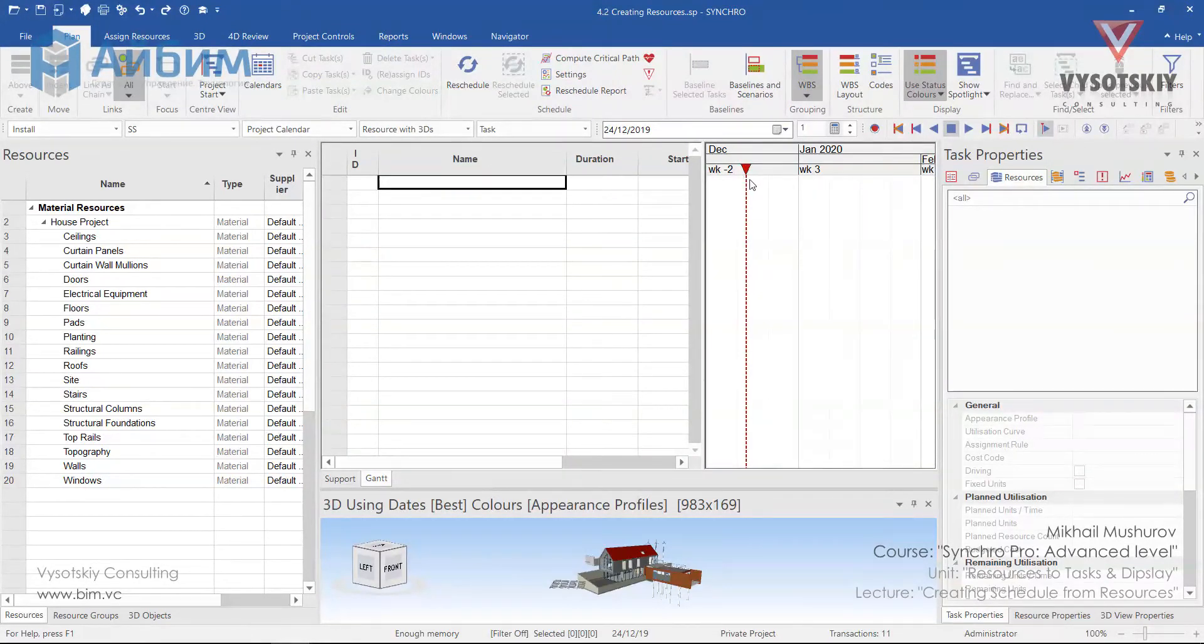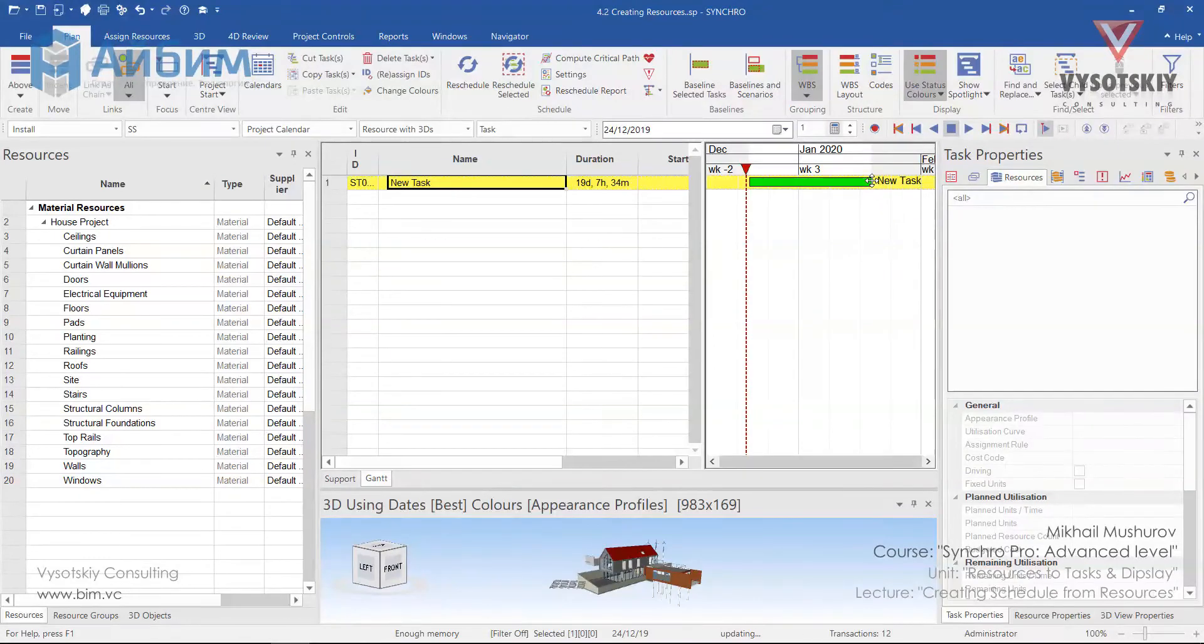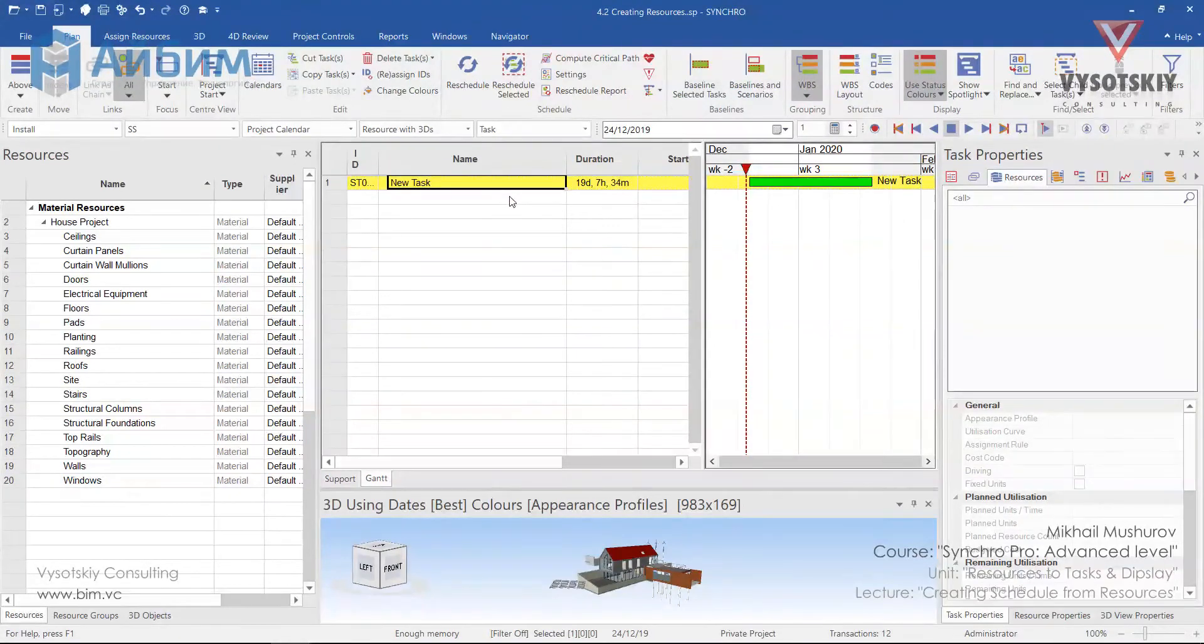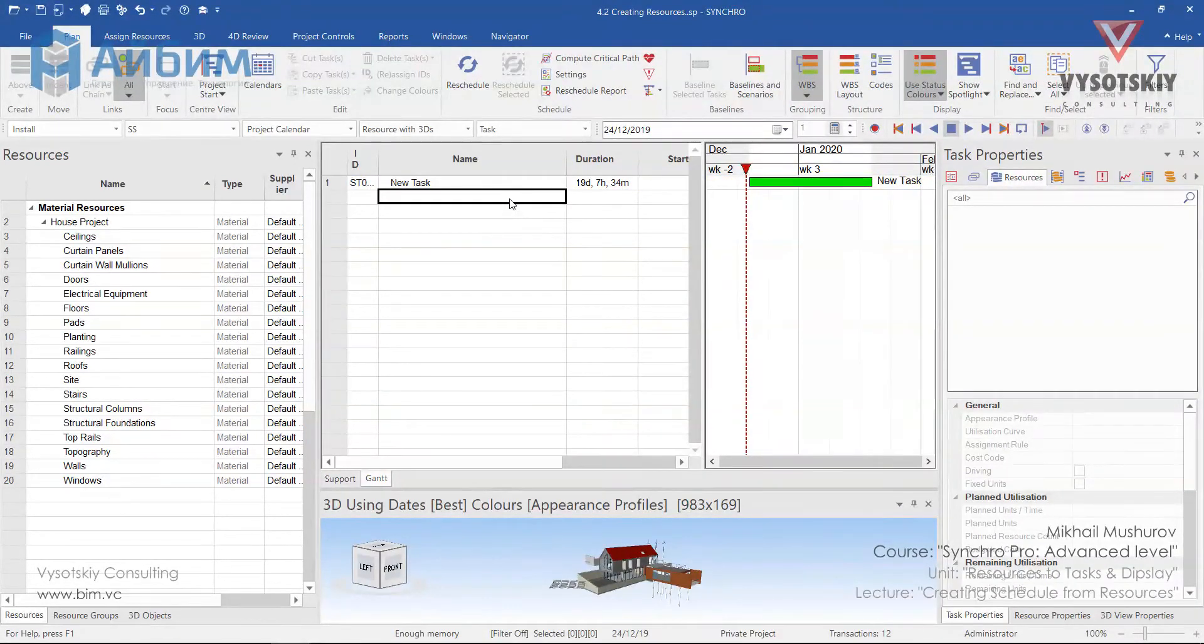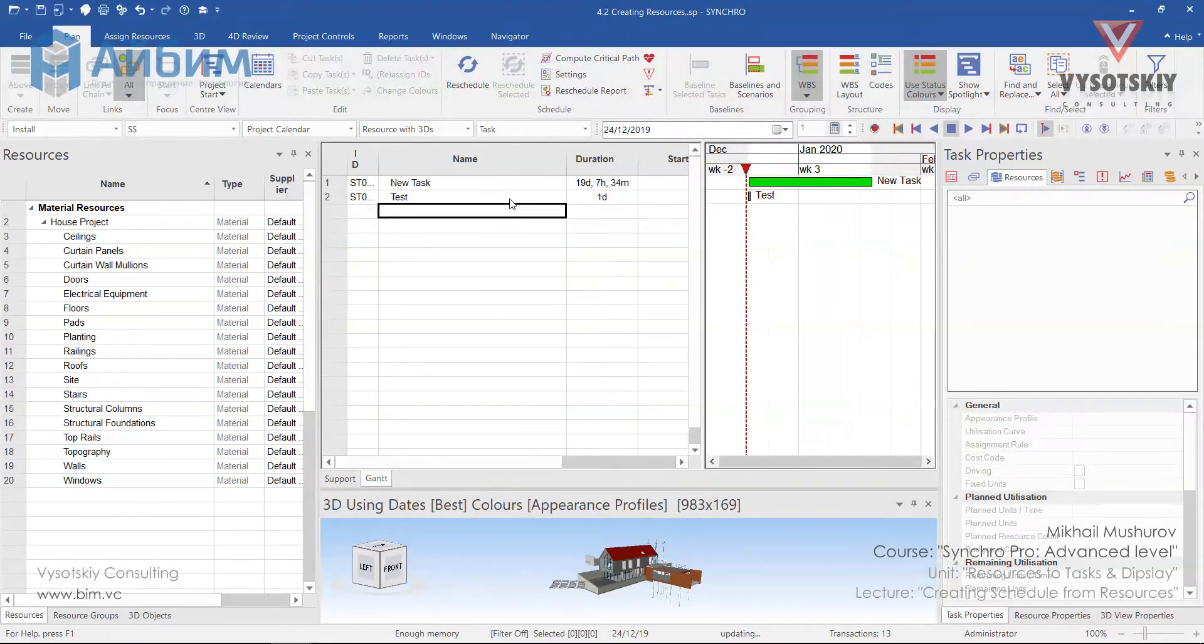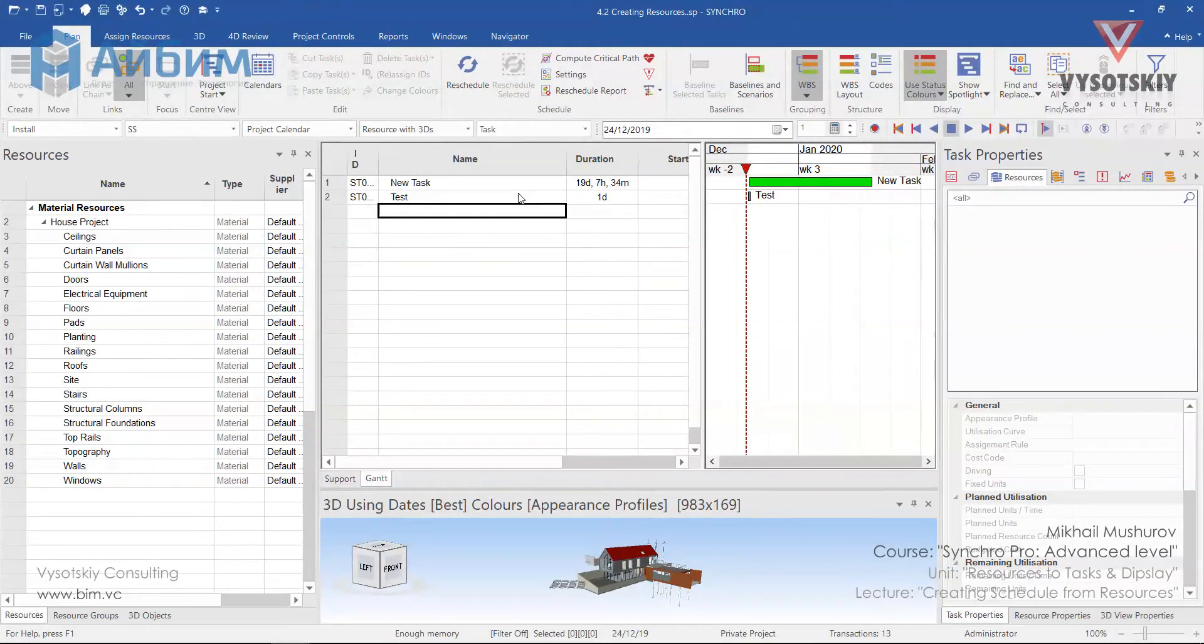First of all, we can draw a line on the Gantt chart and the task will appear. Another way of doing that is we can type a task name and the task will appear in the Gantt chart.